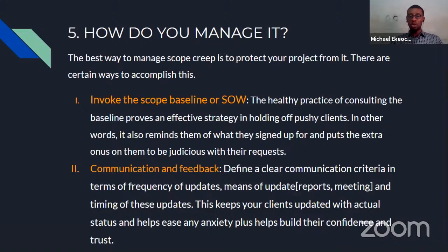So there are certain ways to accomplish this. First is to invoke the scope baseline or the scope of work, that's SOW. The healthy practice of consulting the baseline proves an effective strategy in holding off pushy clients. In other words, it also reminds them of what they signed up for and puts the extra onus on them to be judicious with their requests.